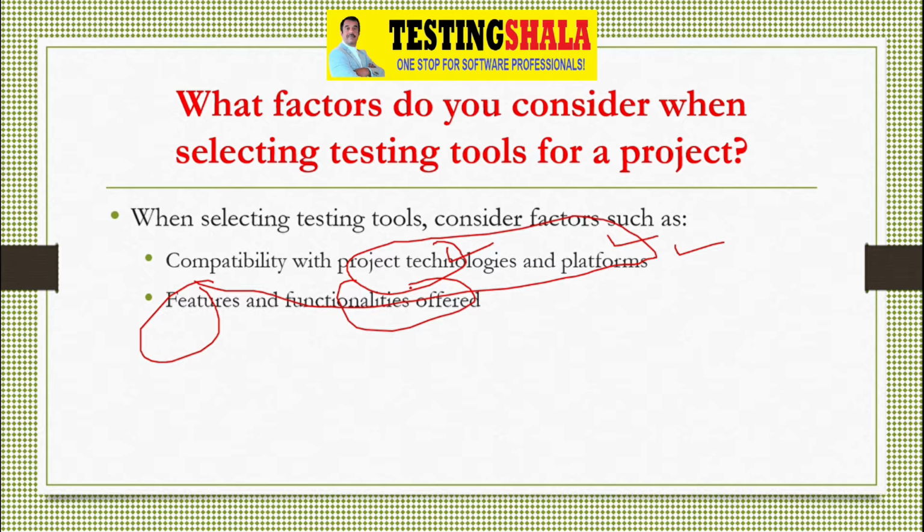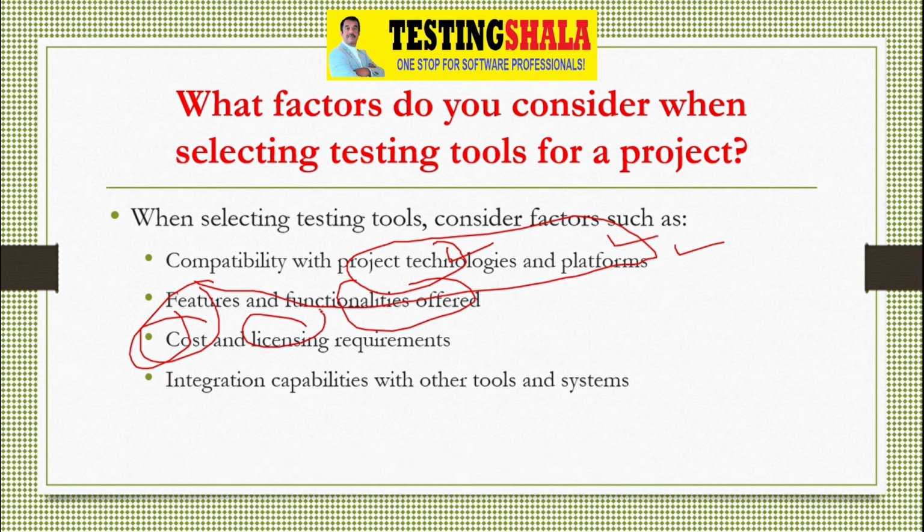Also, when choosing these testing tools, we need to know the cost of procuring those tools, and even the licensing: how much licensing is required and how many testers are going to use these tools. The integration compatibility with our own existing tools and systems is also very key.